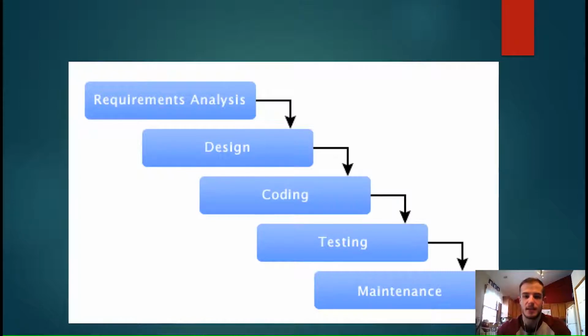And the fact that testing is so late in the cycle is one of the knocks against the waterfall model. So this process right here, these 5 steps, could take 2 or 3 years. So if the testing is that delayed, by then requirements could have changed. The waterfall model doesn't really feature any kind of late stage adaptability. It does have adaptability early on during the requirements analysis and design phases, but as we get further down and the time period starts to get longer and longer, it isn't nearly as adaptable as it is in the beginning.